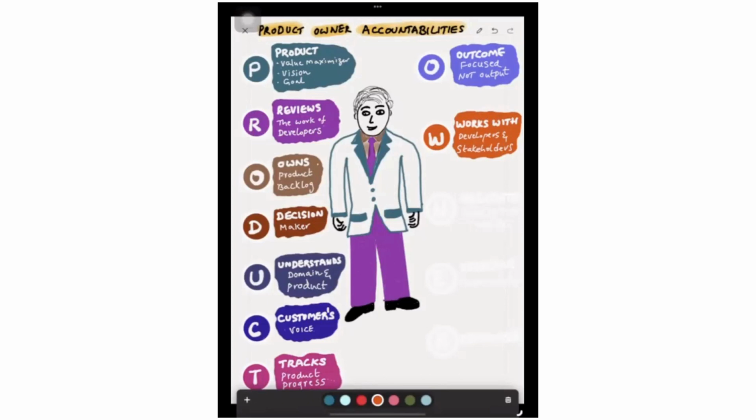Usually the product owner is optional for the daily Scrum, but if they're contributing to the sprint backlog items, or if the developers request the product owner to be there. Throughout the sprint, the product owner is available for the developers for any clarifications or to review items whenever an item is done.